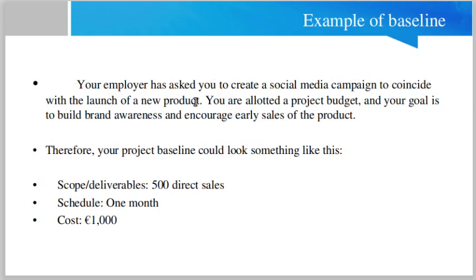Here I just want to give you a very simple example. Your employer ABC has asked you to create a social media campaign to coincide with the launch of a new product. You are allotted a project budget. Your goal is to build brand awareness and encourage early sales of the product. Your project baseline could look something like this: scope, deliver 500 direct sales. Schedule, within 1 month you have to complete that campaign, and the cost is 1000 pounds. So friend, this is an example of the baseline.